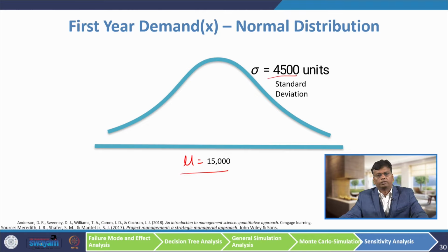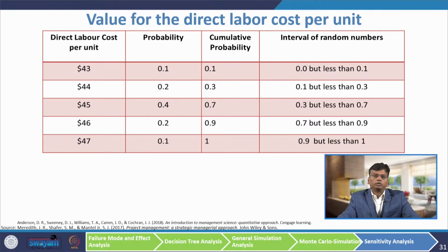These are my assumptions. Now, by considering these 3 probabilistic inputs, we are going to find out the risk of launching this product. Here risk means the chances for loss. In the Monte-Carlo simulation, if there is an empirical distribution, the first step is we have to construct a table.